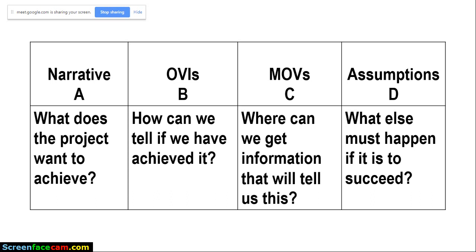But if the indicator that you had intended to reduce, which is HIV prevalence, as I'm referring to it in my example, holds 14% at the baseline, then 2 years after implementation, you've measured that indicator, now it's giving you 18%. Then you must know as a project that we are not doing fine. Our goal is to reduce HIV prevalence, but HIV prevalence has been increasing. Then it could be the problem has changed completely and you are not capturing the problem in your project. Or maybe you are doing it wrongly.